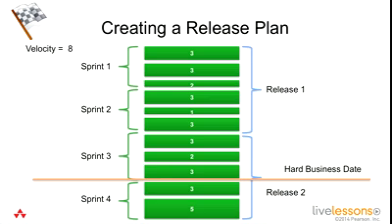If marketing comes in and says this thing below the line needs to really be in that next release, well, then we push it up. But we need to push out the appropriate amount of story points down. Because if we don't, then we're planning beyond what we've proven we can do. And that's based on empirical data.